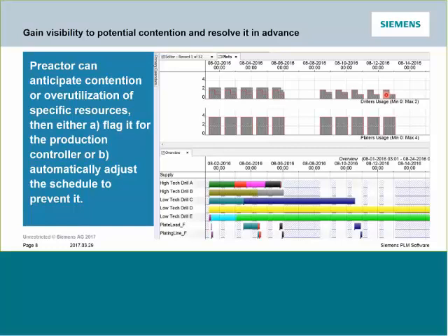We've got 2 on the first shift and 1 on the second. But the issue that arises, particularly at the start of the schedule, is that the number of drillers required exceeds the number of drillers available. You can see the gray rectangle popping up above the red line. So that immediately tells the production controller that, as pretty as this schedule might look, it's not feasible.